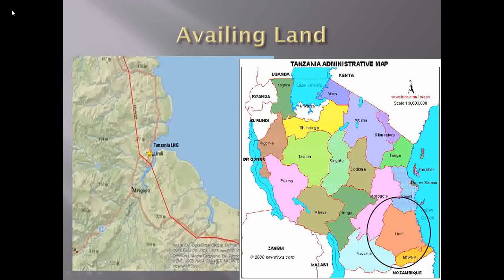So Tanzania has already revoked ownership of 19,000 acres at Likong'o-Mchinga in Lindi, and this paves the way for the construction of the $30 billion LNG plant. This has been termed a major step for the government to gain the trust of the international oil and gas companies, the IOCs. These companies have for long been frustrated by the government's inability to secure the land since it was identified. The government's delay in securing the identified land and handing it over to Tanzania Petroleum Development Corporation (TPDC) on behalf of the companies was the key reason why the international oil companies had delayed the decision to invest.